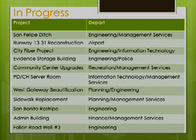The community center upgrade, which is being handled by the recreation department and my department. The carpet is in place. The tile work has been scheduled. We did place a portion of that on hold, which were the parking lot improvements. The original parking lot improvements that were designed to go in out there are not going to solve the problem, and we'd be effectively throwing away $60,000. So our hope is to combine that with another project and get more buying power and to go ahead and do a little bit of parking lot replacement out there.